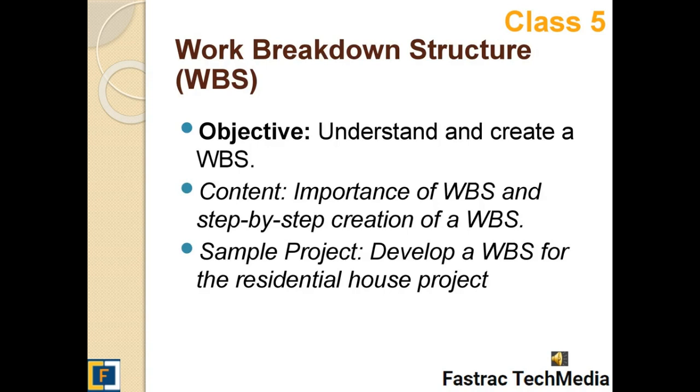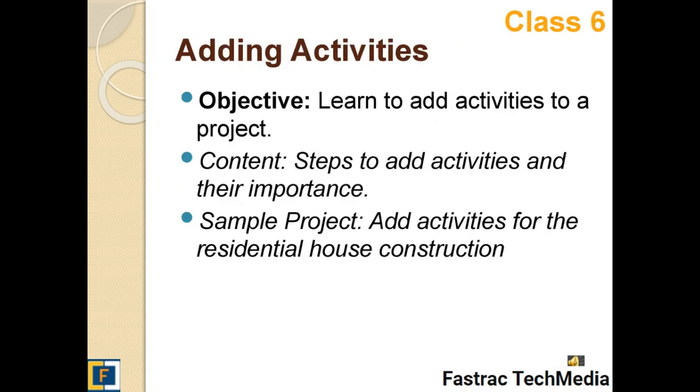Creating a work breakdown structure, or WBS, is crucial for organizing your project. A WBS breaks down your project into manageable sections. In this slide, we'll create a WBS for our residential house construction project, identifying key phases such as site preparation, foundation work, and framing.